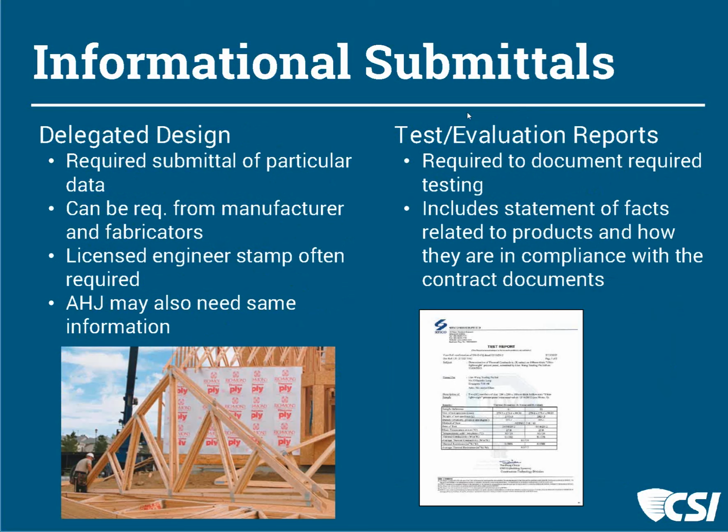The particular data of how they're designed, what the connections look like, can be very specific to a manufacturer. If you're doing design, bid, build type work, you have to accept equals, and they can be equal yet have a varying structure. So we assign that, we delegate that design to the manufacturer, and we want to be sure that they have done that.